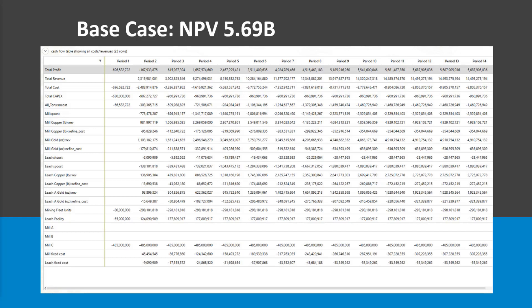The mill is shown in yellow and the blue is the leach pad throughput. Even with the fixed cost, the leach was up and down a little bit. The important things to note are the base case NPV was $5.69 billion, and my first period's cash flow was negative $696 million. That's within my company's budget.